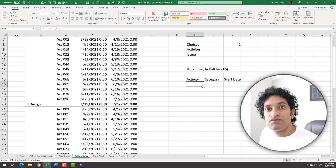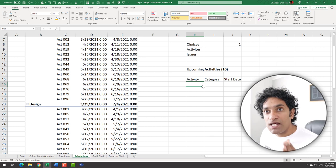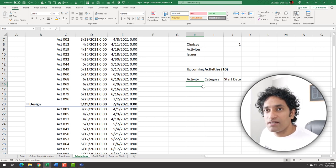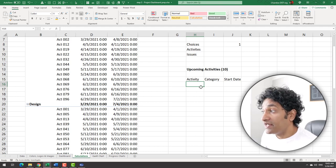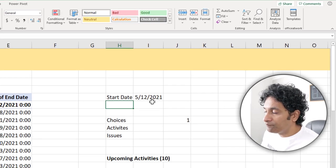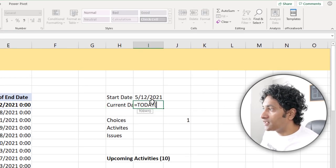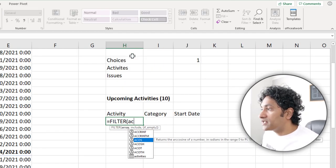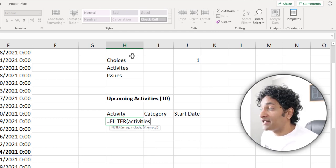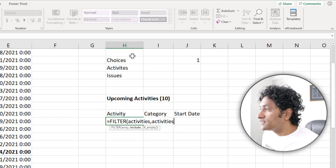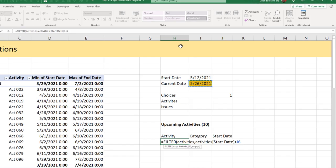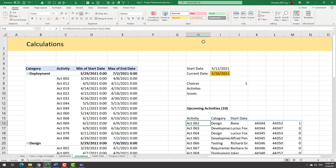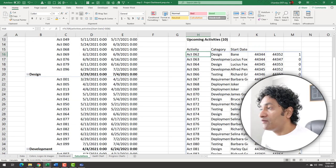For the purpose of this dashboard, let's say we want to show upcoming 10 activities. That means the start date of these activities should be after today. And we just want to show the 10 activities. If there are like 200 activities, we'll just limit it to 10. So to do this, we do need the current date, the today date, we will set it up in a cell so that we can refer to this all the time. Now we could use the filter function to do this filter activities table. Remember, this is the table where all our data is maintained. And then we can say activities start date is greater than that value i6. And when you close the bracket, you will get all such activities who have a start date after today. Now, as I said, we just want to see 10 activities, not everything in this list.